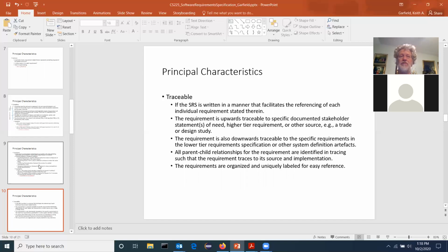Traceability becomes a big deal in terms of, once you have 100, 200 requirements, it's hard to manage, right? So you have to do a couple things. You have to trace backwards to make sure that all 200 requirements actually had to be there. And then you need to trace forward for completeness to make sure you actually met all 200 requirements. So traceability becomes a big topic in sophisticated software, production software.